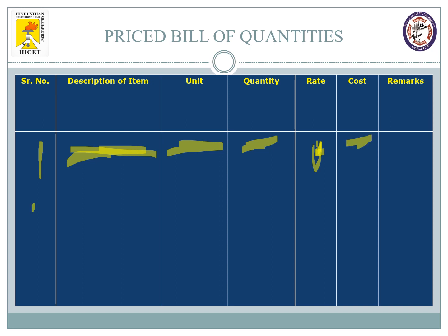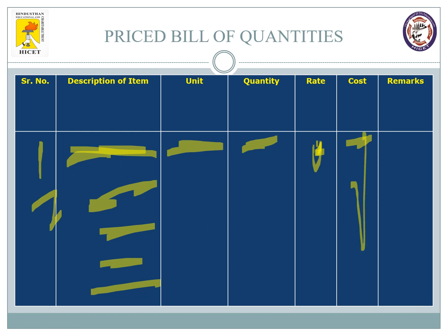Similarly, I'll go for number two. This will be my brickwork, this will be plastering, this will be curing, and all kinds of RCC and PCC work will be done. At last, if I sum all these values, I will get the final cost of my project. That is the main aim of my estimation, and this format again has to be followed. You cannot deviate from this format, right?